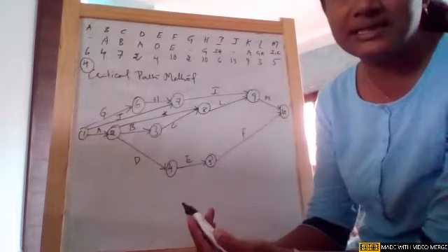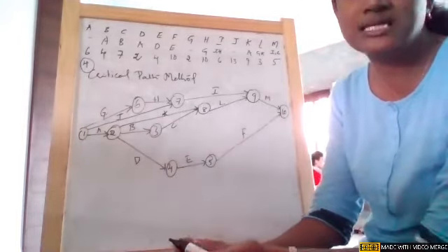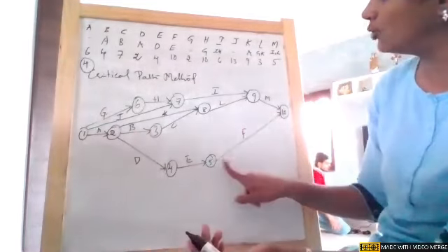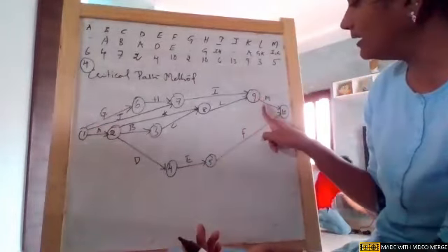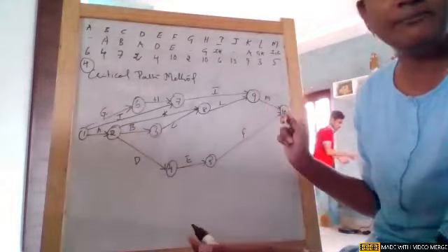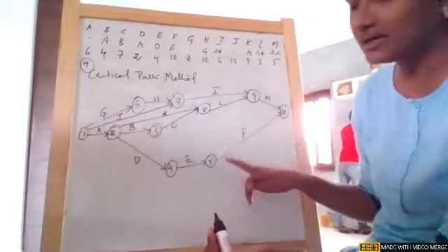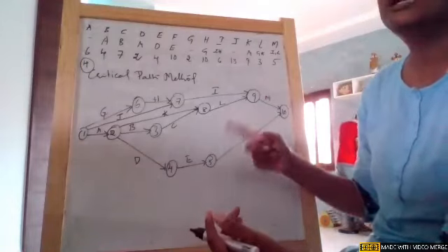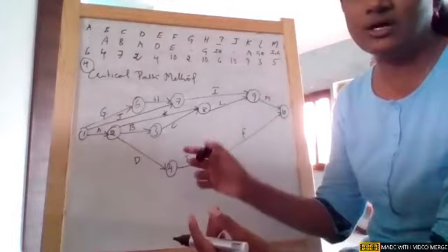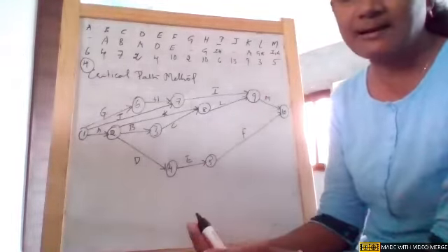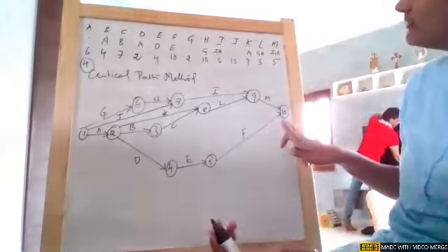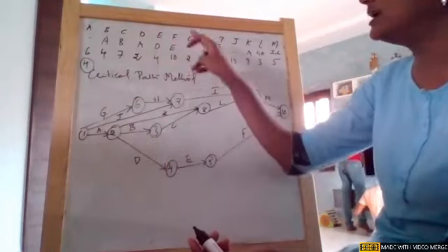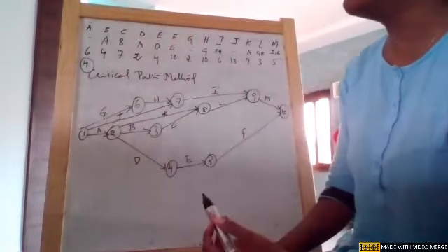In our earlier examples, there was no network like this; always they were starting and ending with a node. Earlier it was only one activity which was ending, so obviously I used to write it, but now there are two. If there are two leaves, activities or events which are left out, you need to close them with a node. So this is how your network is constructed with the help of the predecessor activities.